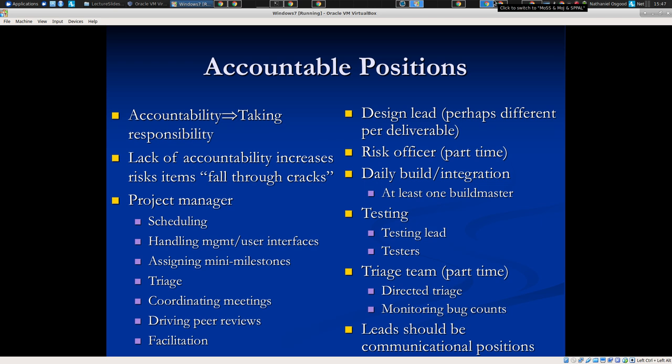Look, you've got to turn in these deliverables 5 times. The project manager's job is to make sure things don't fall through the cracks, make sure things aren't duplicated, right? You don't have 2 people doing the same work, or doing work in a way that is each good, but it won't mesh together. It makes totally different assumptions, it's using incompatible technologies. So they're taking ownership of making sure this comes together. And they might not do all the documentation. That might be someone else in the team that takes on that documentation role. But their job is to make sure things get done, they get looked after, that all the T's are crossed and the I's are dotted. That's the job of a good project manager.